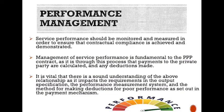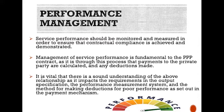Performance management. Service performance should be monitored and measured in order to ensure that contractual compliance is achieved and demonstrated. Management of service performance is fundamental to the PPP contract, as it is through this process that payments to the private party are calculated and any deductions made. It is vital that there is a sound understanding of this relationship as it impacts the requirements in the output specification, the performance measurement system, and the method for making deductions for poor performance as set out in the payment mechanism.